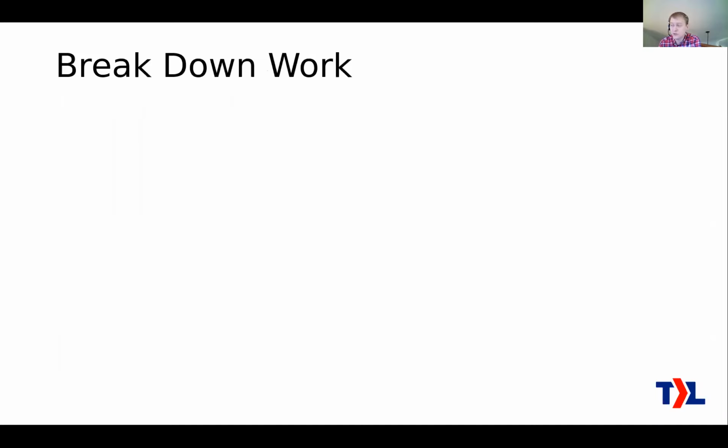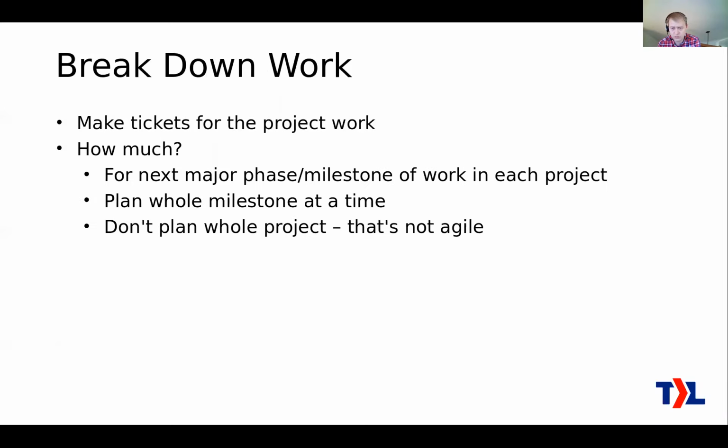The next stage here is you break down the work. This is where you make the tickets and tasks that describe the work. So how much do you actually have to break up the work right now? You don't want to do too much, but you don't want to do not enough. Here's what I would say: figure out your next milestone. So what's a big section of work, something that the customer would get a lot of value out of? That's your next milestone, basically, or your phase.